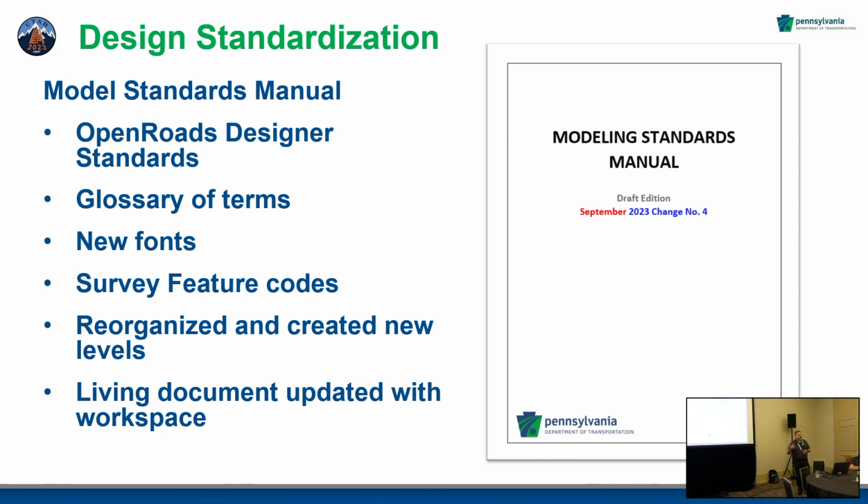The levels, the line styles, the fonts, all that stuff is now coming from one centralized location, where prior to this initiative, we had 5 different manuals that the data came from. We had to centralize that, we had to standardize it. If you don't standardize, the contractors, the consultants, they're all doing their own thing. You have to get that deliverable that matches no matter who's producing. Whether it's internal, external, it has to match. It has to be followed.